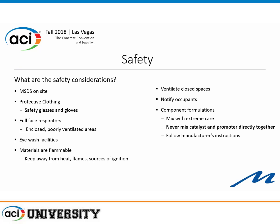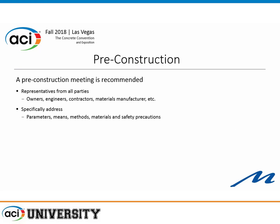There is a potential for explosion. Most manufacturers pre-mix the material, but you can never mix the catalyst and the promoter together because it will cause an exothermic reaction and explode. Follow the manufacturer's instructions. We recommend a pre-construction meeting to go through what needs to be done — particularly with regard to safety, odor, what needs to be closed down, how long it needs to be closed down, and coordinating all of that information.